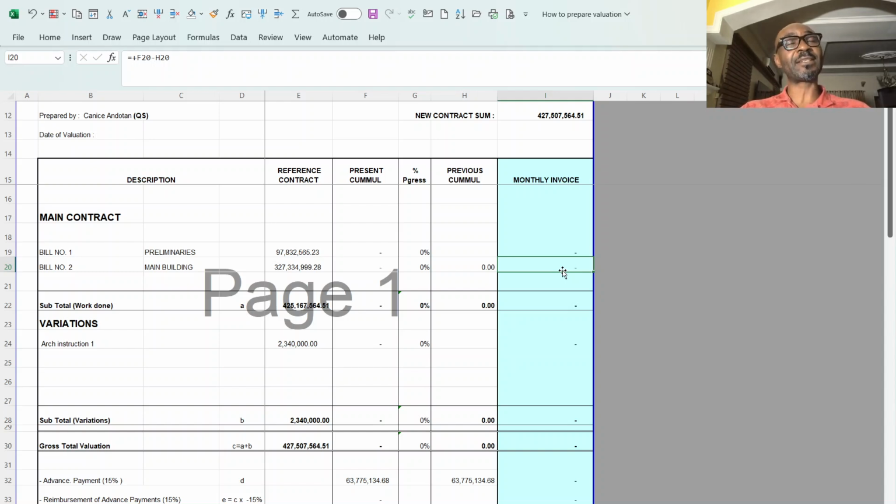You should expect that if the contract has stipulated that a particular percentage will be retained as retention, when the client issues you a certificate for payment, the figure you presented, if your quantities are the same, will be less 5%, which is the usual standard for retention.